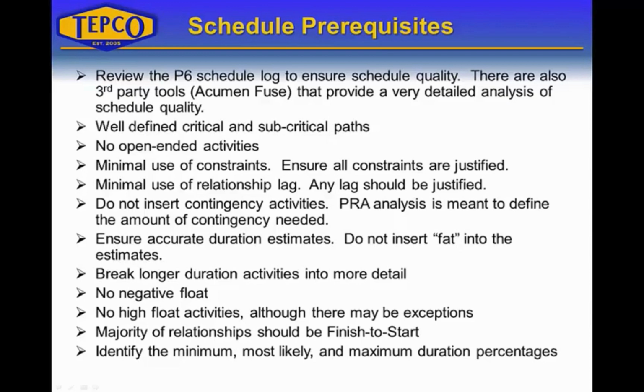No negative float. Negative float implies that you're already behind schedule. Primavera risk analysis is typically performed before you execute. You should not have any negative float in the schedule.